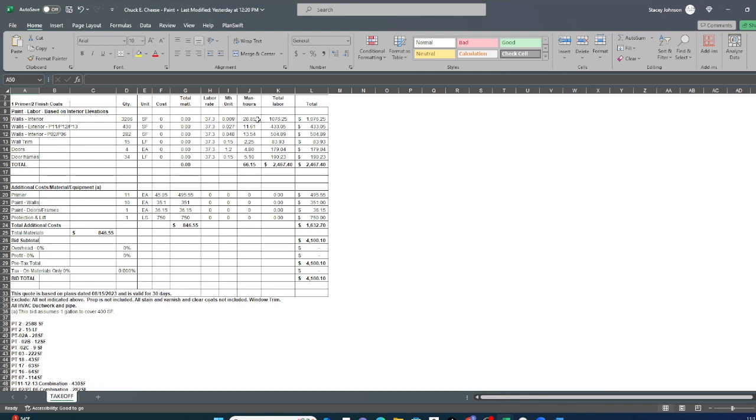That's how you know accurately based on construction industry standards, how long it's going to take you to do a job. Then you can determine how many people you need. The construction schedule should tell you how many days they expect you to take to do the work. And then you can decide how many people you need to do the work in that amount of days.